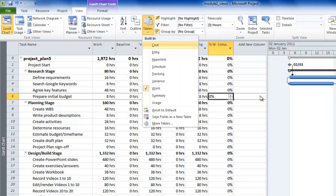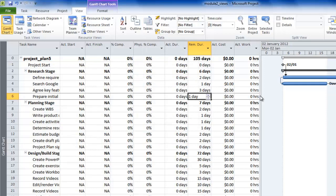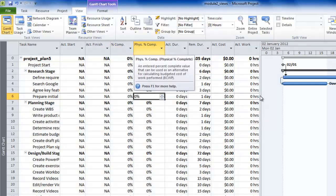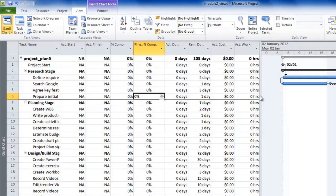Just one more I'd like to cover, and that's the tracking table. This shows the actual start date once you have in fact started work on the task, and the actual finish. This shows the percentage complete - this will be duration complete - and a field called physical percentage complete, which is to do with earned value so I won't touch on that now. Here's the actual duration and the remaining duration. This is one of the reasons I like the tracking table - if you are tracking a task at just the duration level, remember what I said at the very beginning: you should set Microsoft Project up to have just enough information to be in control. For a simple project, all you need to enter is the actual days worked on a task and the remaining days, and you don't need to track work at all.